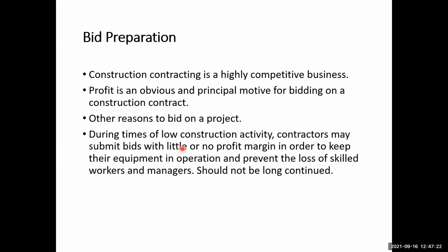Of course, these are some of the exceptional circumstances. In most cases, every company would like to get the profit. But in some situations, when there is not much construction activity and not many opportunities available, the contractors may bid even at a very low profit margin to keep their equipment in operation. Because if they do not keep their equipment in operation, then they may be paying for storage fees and maintenance fees unnecessarily.